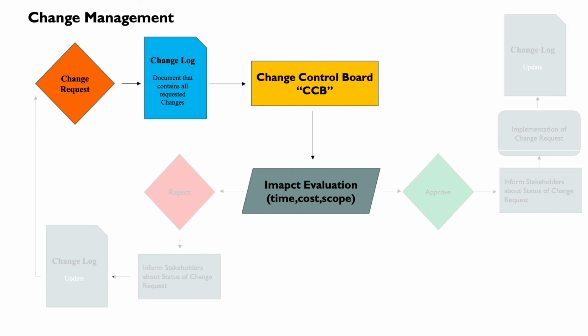The procurement department says we have a contract with a vendor and all materials will be delivered according to the contract. If we change the deadlines of this contract, it is already specified that we have to pay 40% more, which financially doesn't fit the reserve for such an issue. So we can order some cheaper materials from another vendor. And the audit in this case says that these materials are not good and quality will suffer. The sponsor, as a member of the Change Control Board, has the final say in this decision. If he agrees to allocate more funds for this project to compress the schedule, he approves the change request, assuming all potential risks.